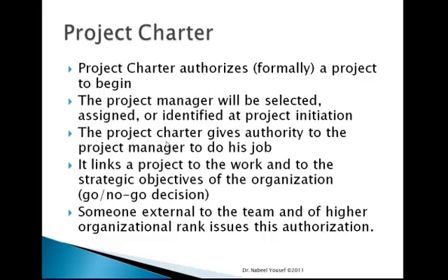And it links the project to the work and to the strategic objectives of the organization, which is the go or no-go decision. Someone external to the team and of higher organizational rank issues this authorization, approves that this project is a go, and assigns the proper project manager to that project.